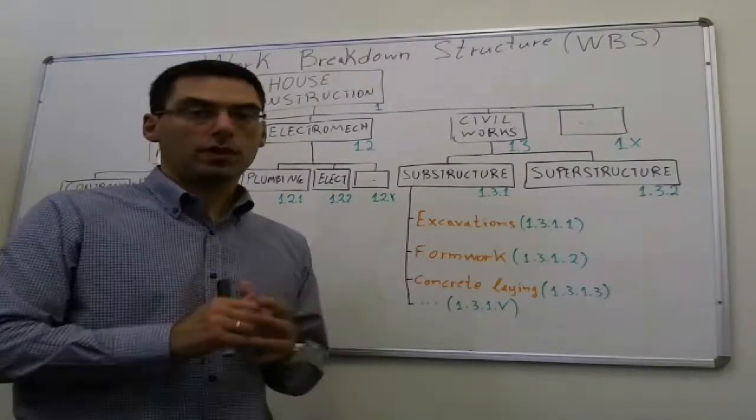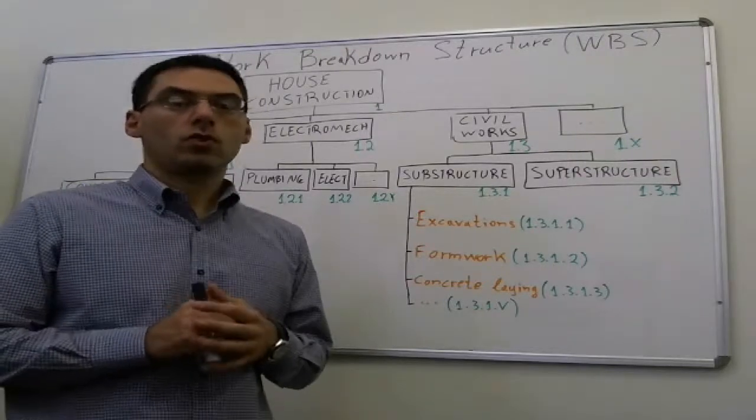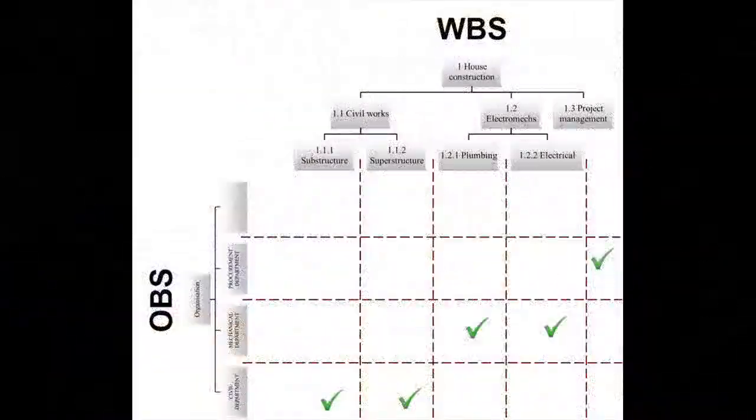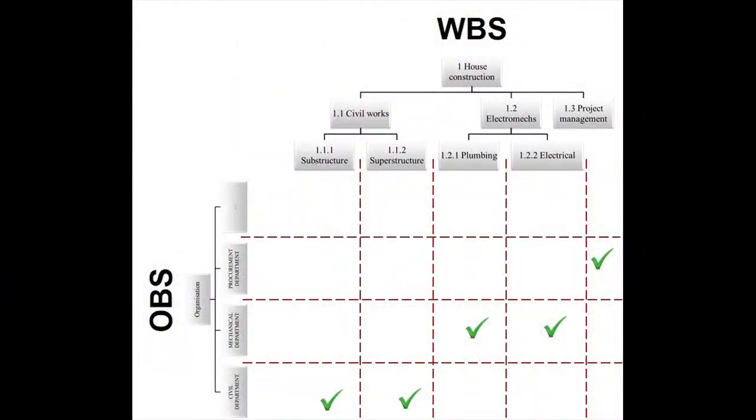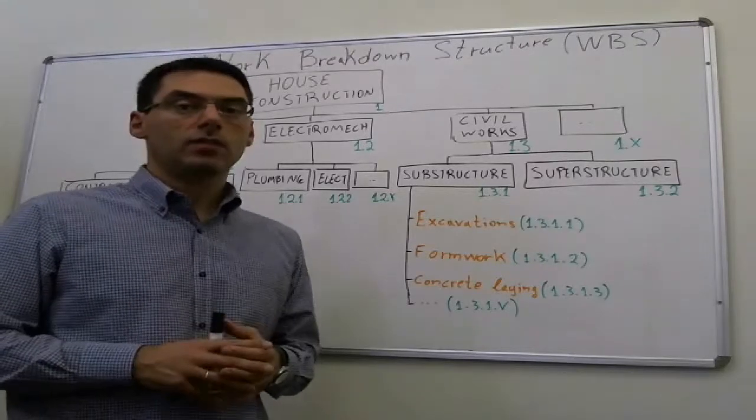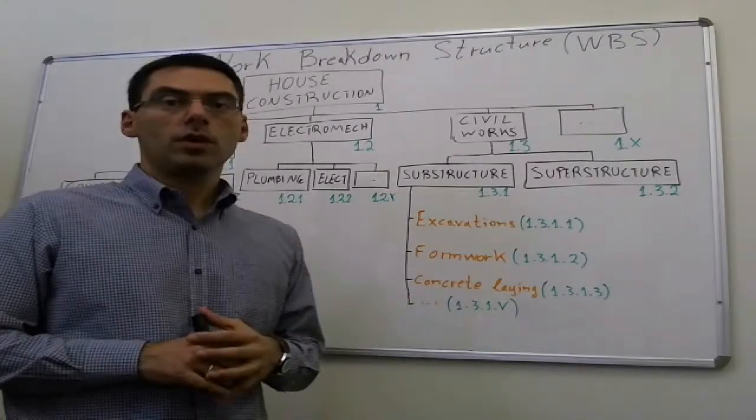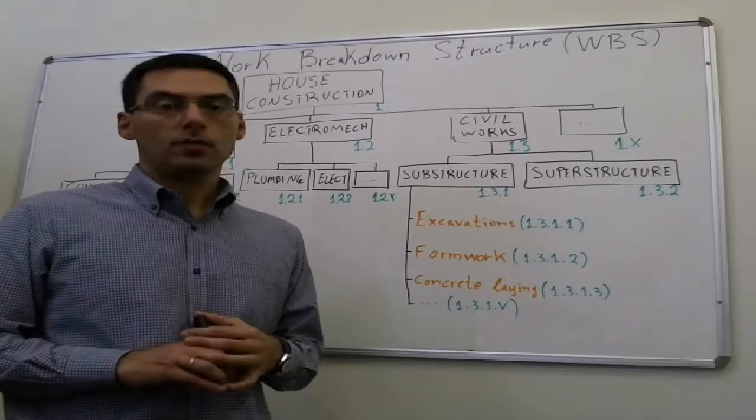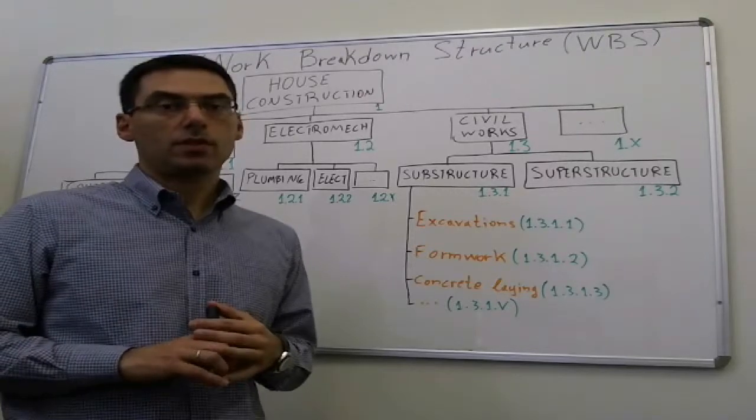You can also use the work breakdown structure in combination with the organization breakdown structure. This will produce a matrix that will help you assign responsibilities. So, each piece of work is going to be assigned to a specific department in your organization. The very last thing is that having defined better the activities through the work breakdown structure, you might come up with new stakeholders. And this is, of course, very important for the project management of your endeavor.